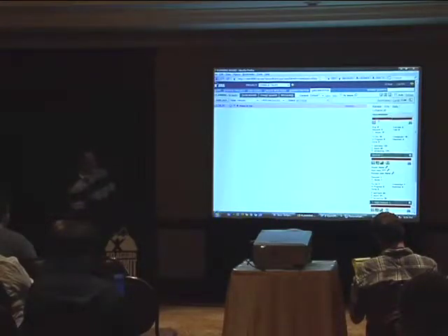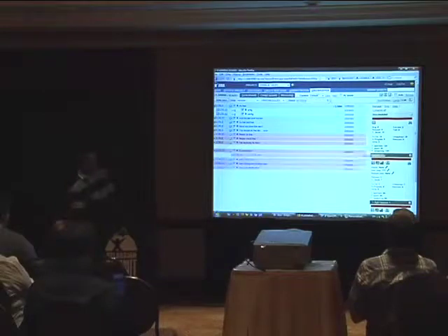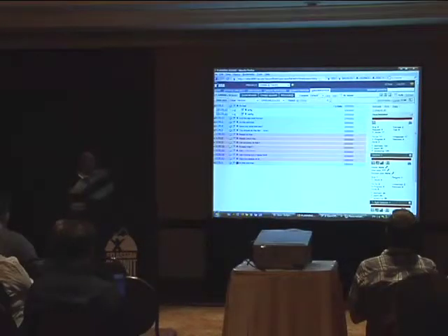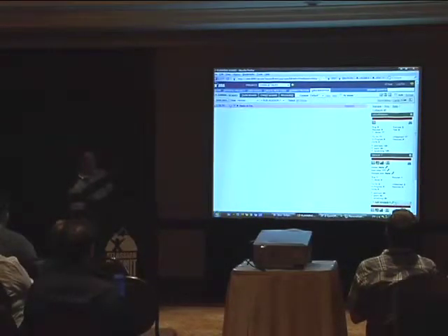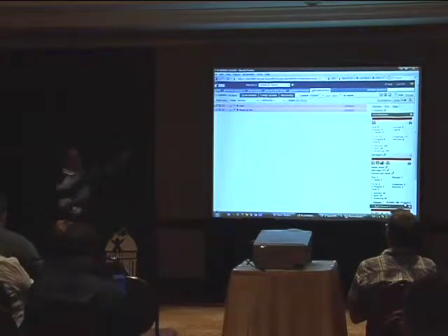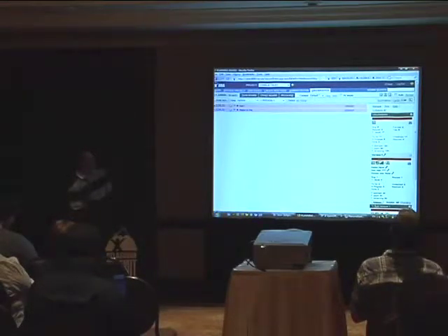And of course, when you do some planning, if you drag and drop an issue directly in the parent version, you will not see it in the subversion because it's not assigned to it, but you will see it in the master version right here. And to help you, you have what we call the pending link. If you click on it, it will show you all the issues that are associated with version 1 and not yet in a subfolder. So when you're doing planning, you have a release with subversions, and you push the issues into the subversions, and you will want to see what's not yet committed, not yet planned.